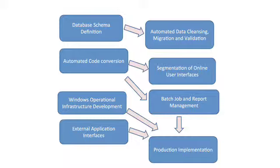After we'd gotten through all the online environments and gotten those all unit tested and kind of working, we went into the batch side of the application. Tiburon took the old JCL and the old COBOL batch programs, converted those, and those pieces were delivered to us, and we continued the testing of the solution at that point.